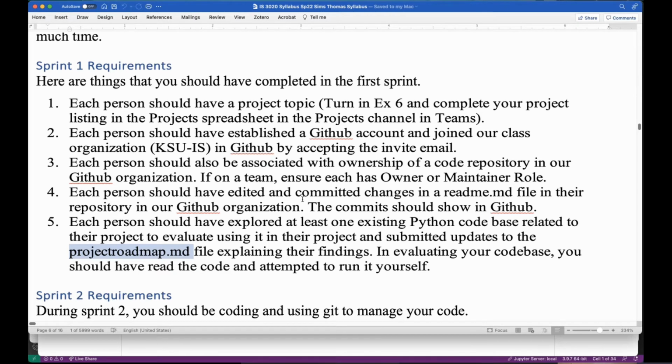So if I have a technology team, I'm not expecting them to start making code in the first section of a project. We're going to do due diligence. We're going to be looking for existing code that makes sense. We're going to be trying to test it out, download it, run it, see if it does something, if it's working, or does it throw errors? Can I figure out how to run it? Is it well documented?